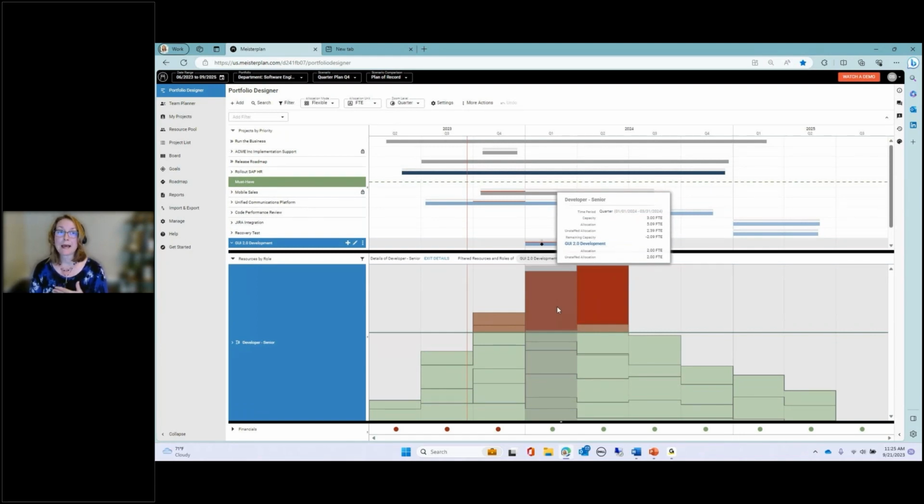The reason I bring this up is that it could cause a budgetary discussion of what if I have to hire some senior developers? Can I even hire them? And at what time could I hire them? And those that are on the phone probably know this. Long-term planning is critical to have enough lead time to figure that out. That is such an important factor, whether you're doing an agile framework or waterfall. This is typically a question that has to be answered: what are the teams that need to be in place in order to get this work done? So that's the first, and it has a cost implication if I have to hire.